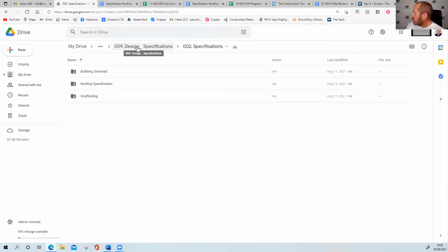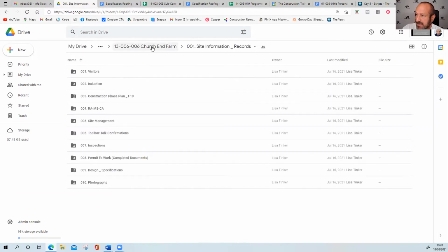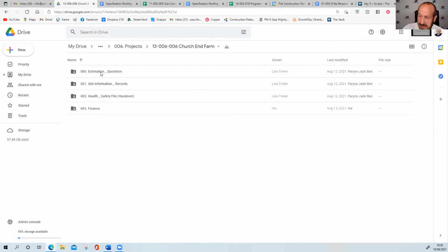So I'm going to have a set of drawings. I'm going to have a program of works, and I'm going to have a set of photographs, which I can now send out to some potential suppliers. What I mean by that is some potential roofers, some people that could do that work for me. So I'm going to go back into here and I'll show what we do next.